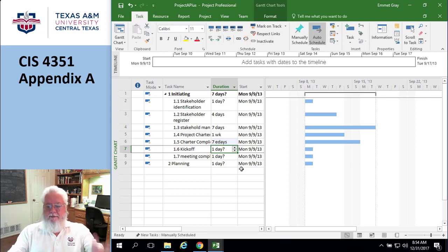So let me get through the list. Again, page 32. D for days, W for week, H for hours, MO for month, ED for elapsed days, EW for elapsed weeks. I use that one a bit. And so it's kind of important to understand the difference between these things because this is a work week.